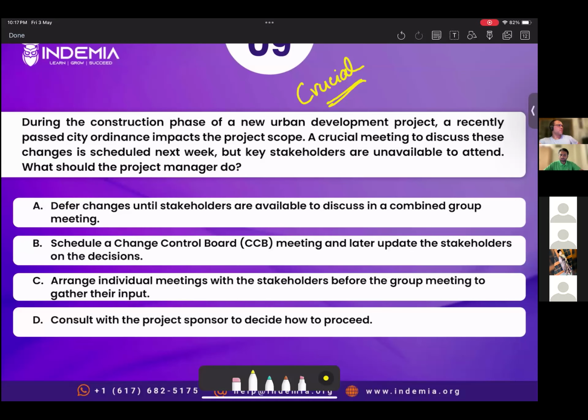Consult with the sponsor to decide how to proceed. As I mentioned earlier, we do that, but it's the last resort. We propose solutions to the sponsor rather than seeking guidance. We seek guidance when we have done everything, every possible thing has been done, and we don't have any solution, then we escalate and we approach the sponsor to handle the situation.